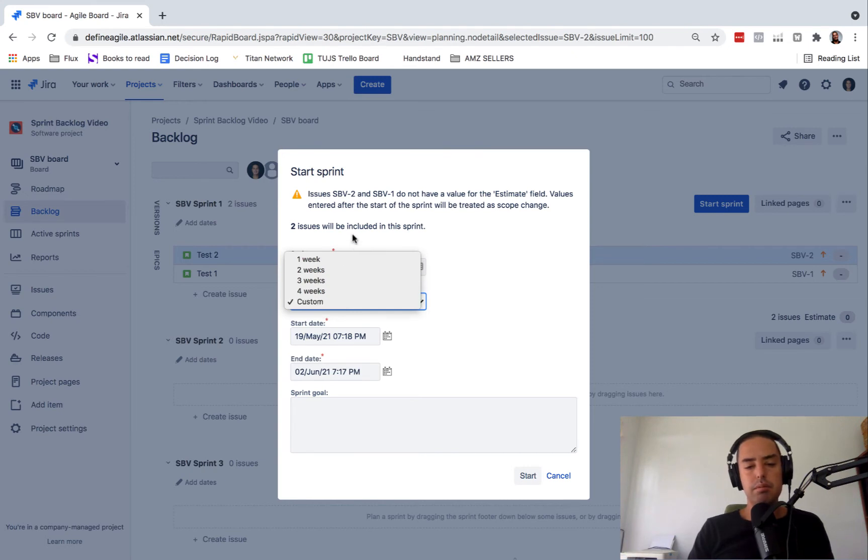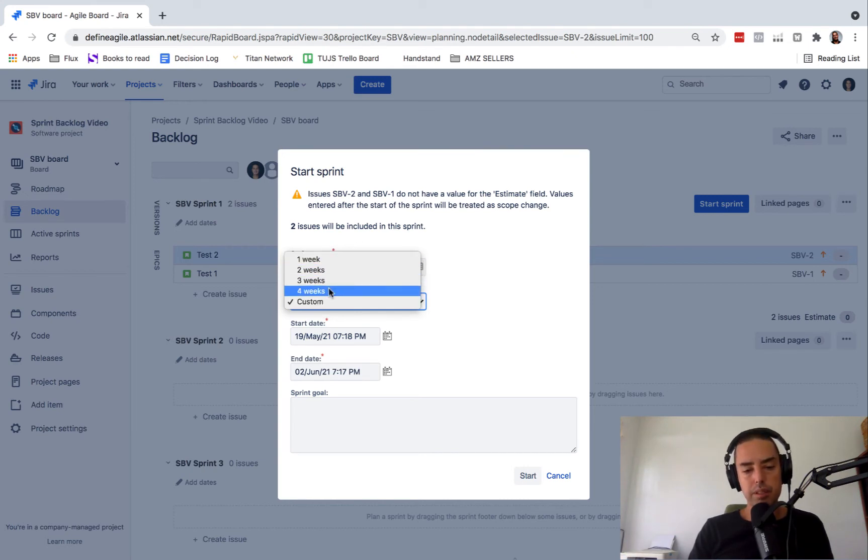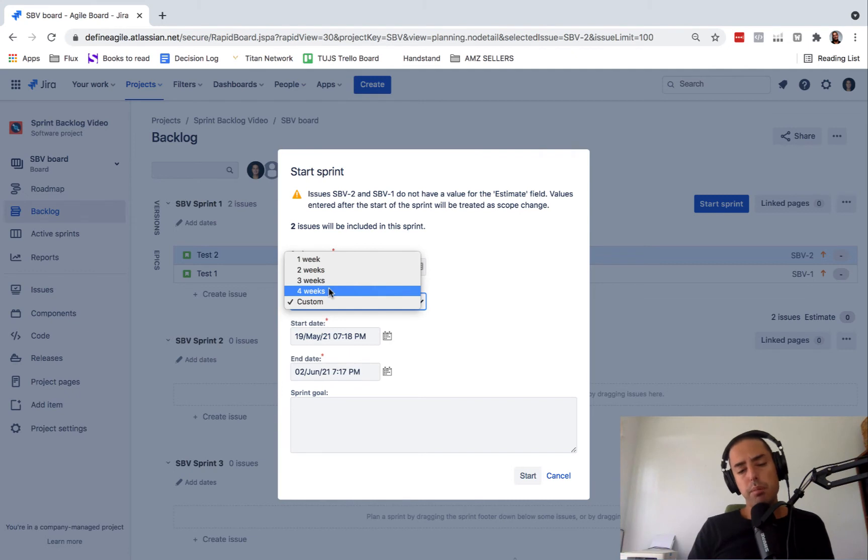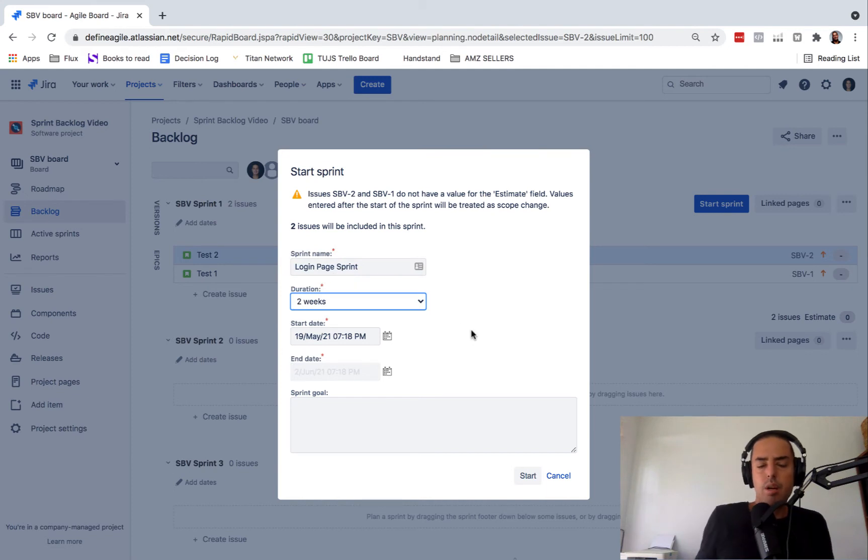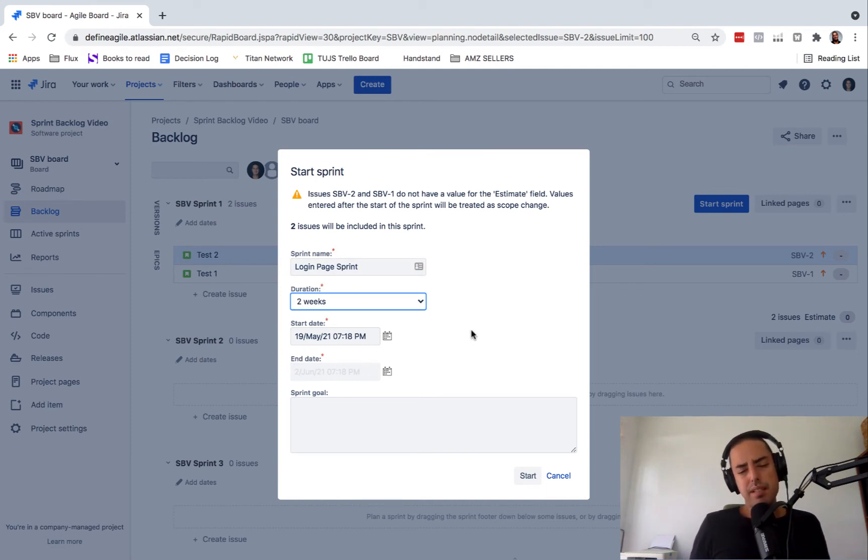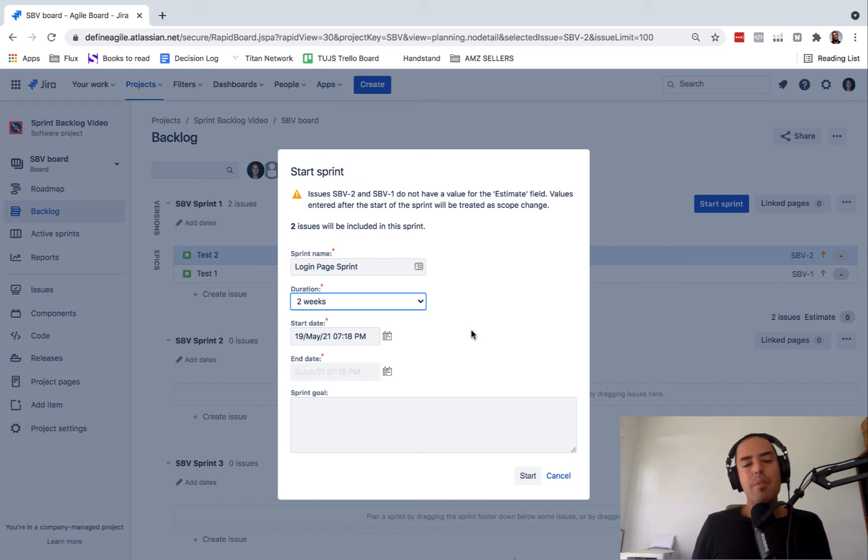Duration. It can be one week, two weeks, three weeks, or four weeks. It's up to you. You probably know your durations. In my teams, we usually try to stick either with two or three weeks. One week is too short and I need to do retrospectives every time. Four weeks, you're forgetting what you're building. So I recommend two weeks, short iterations.